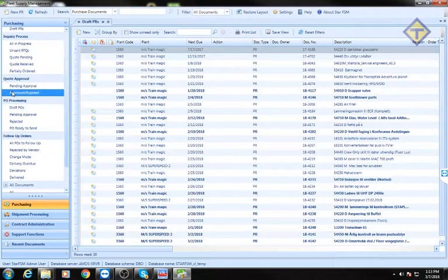During the quote approval, I can set in FSM that before I create a PO, someone in the office must approve the quote before I proceed to a PO. Or, what is more common, I can let purchase create POs but stop them when they have to place the PO to the vendor.